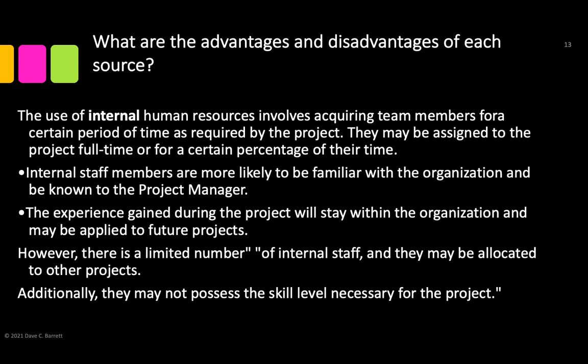Internal staff members are more likely to be familiar with the company, and sometimes they are known to the project manager as well. The experience gained during the project will stay within the organization and may be applied to future projects. However, there are a limited number of internal staff. You might need to hire a few more employees.